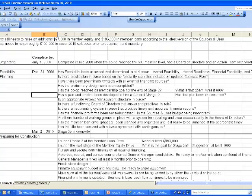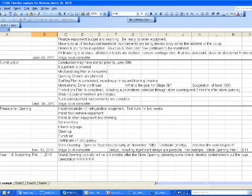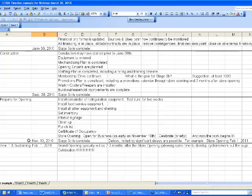So they will be behind, and it will be important to revise this. It looks like, as Mac said, you're looking at entering into a second letter of intent related to your site. I would recommend that you really need to have your lease agreement finalized — with all your rental terms — before you move into stage 3A. This format shows the different stages and the tasks that need to be done for each stage, and shows a potential opening — maybe as early as November 2010, but more likely with delays the store opening could be February 1st, 2011. There's still a great deal that needs to come into place — financing, fundraising, lease, and hiring of a general manager. The idea is you keep pushing at it and revise your timeline as needed.